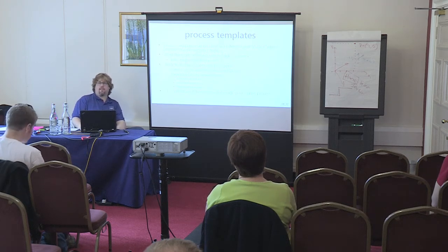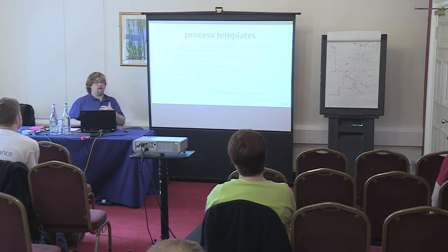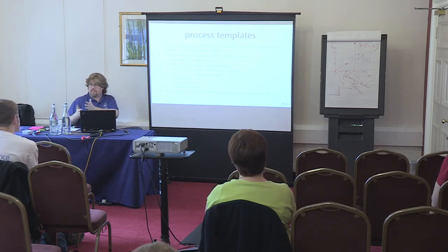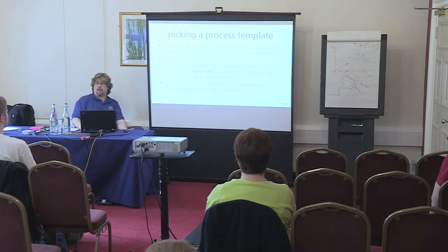The key is that the collection you pick determines the overall process. Now, the nice thing is that you can mix and match. You can have one team project that is using a formal template, another one using Scrum, and another one doing Agile. It's the project level, though, that is the boundary. You can't do it within and change. And once you pick it, that team project is on that path. Okay? Review the docs, can't customize. And once you pick it, you can't change it. You literally would have to create a new team project to move your data over.